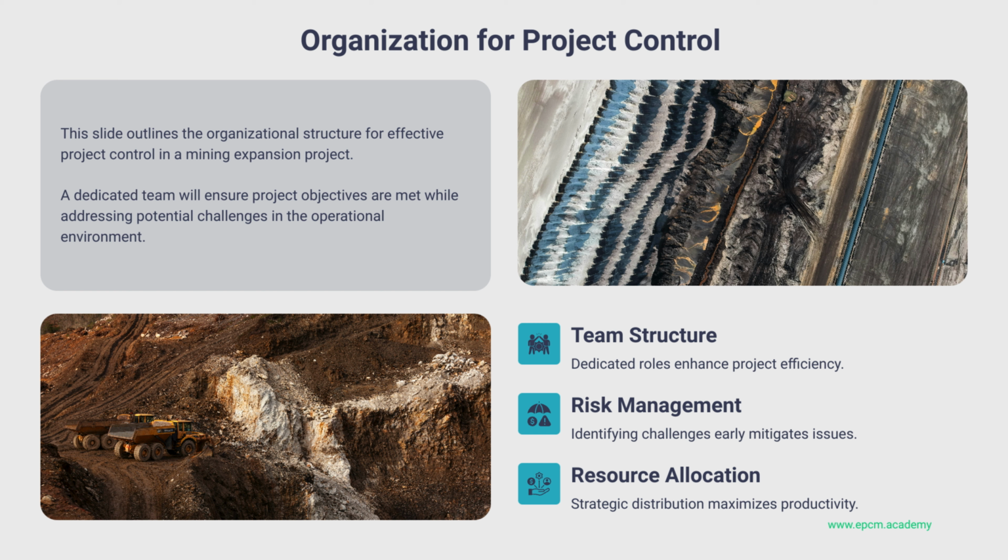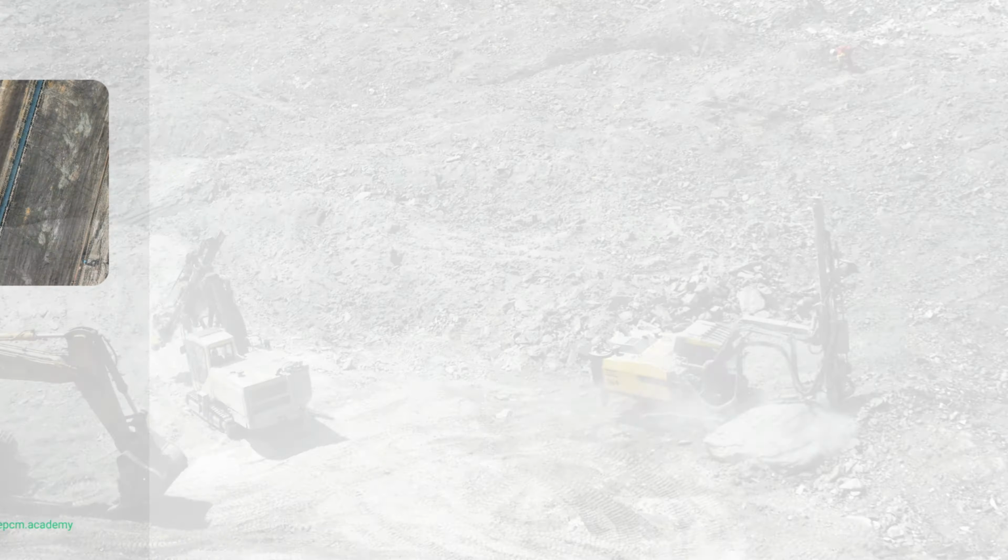So how do they approach the execution strategy? For this mining expansion, they're taking a phased approach, starting with detailed engineering, then moving on to procurement, and finally tackling the construction activities. This allows for better control and flexibility as they go.